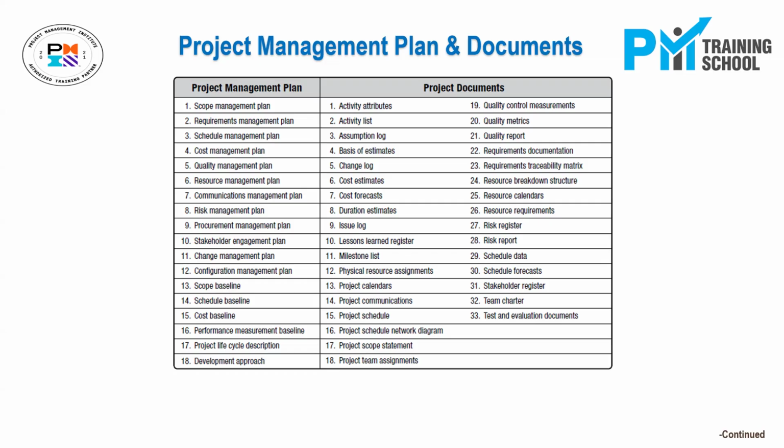Anything else? Yes, it is governed by the integration of the project management plan. Exactly. Now, these are the only documents which could form part of the project management plan. But during planning, you have created many other documents. You created an activity list, assumptions, basis of estimates, change logs, cost estimates, and what not. But those are documents which led you to the final baselines. So the executable thing is the baseline. All other documents, which were interim documents in the production of those baselines during the planning of the project, will go into another basket we call the project documents.